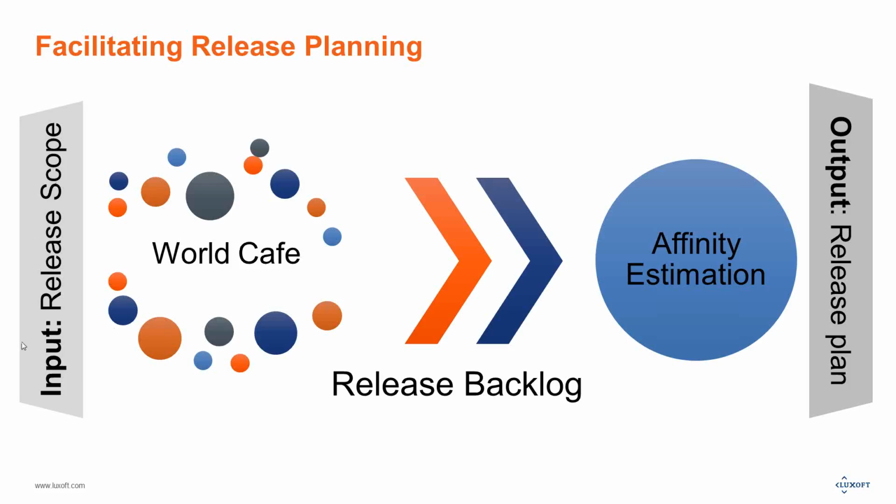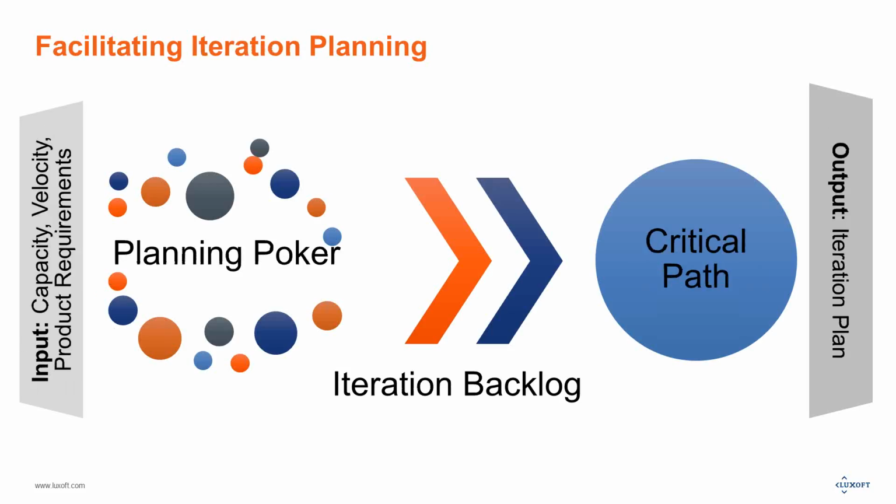The next template can be used for facilitating iteration planning, like sprint planning, with the sprint as the iteration. And again, as an input, you use capacity. Capacity is a quantity, the number of hours available for the next sprint, for the next iteration. It is the hours without meetings, without vacations, days off, or any other activity. It is clear hours of development work.